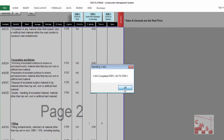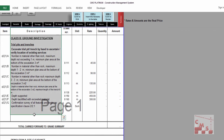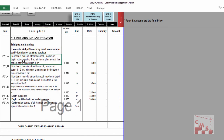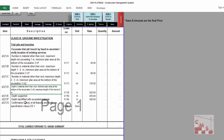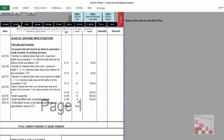Step 1 is done. In Step 2, you insert the necessary data in the table. CMS provides full descriptions for all requirements — you can keep them or change them according to your project specification. Change the rates according to market rates and insert quantities accordingly. CMS calculates the total amount for each division.